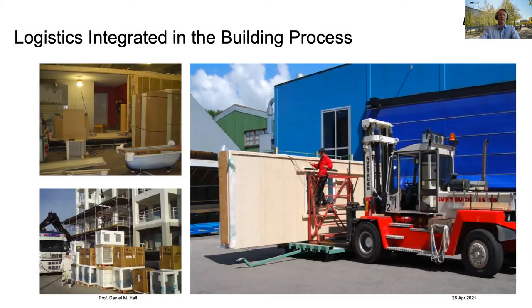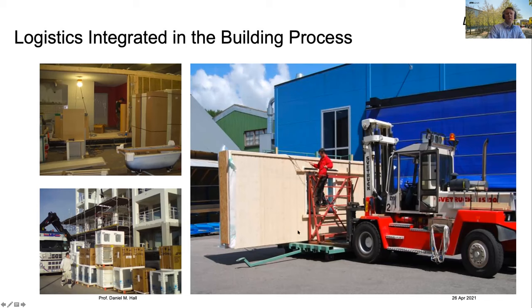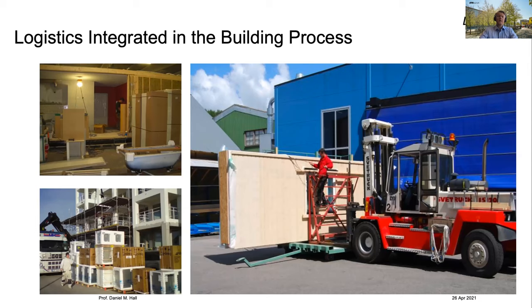Here's a picture of what this logistics looks like. You can see the idea on the top left of prefabricating things like the bathtub — the bath is being installed, so you have to think about the logistics of carrying and making sure that bath is secured and not damaged in the whole process. In the bottom left you can see pre-delivery of certain parts and components, and here specialized tools are used for loading large panels onto trucks. You start to get into the specialization of equipment.